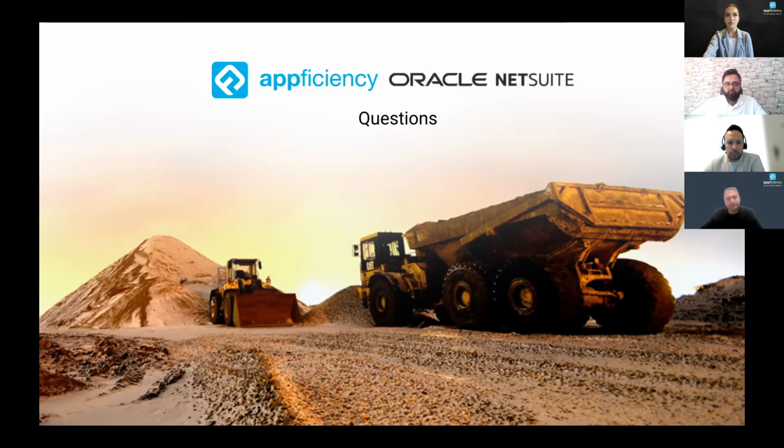And that's where the flexibility of NetSuite and Efficiency solution comes into place, that you have the ability, or the project manager in this instance has the ability to look at the percent complete based on what the system calculates using the cost incurred. But then they're able to see in reality that, okay, this number is not reflective of the true work that has been done. So they will go in and they can easily override that particular number and then bill the client according to that.